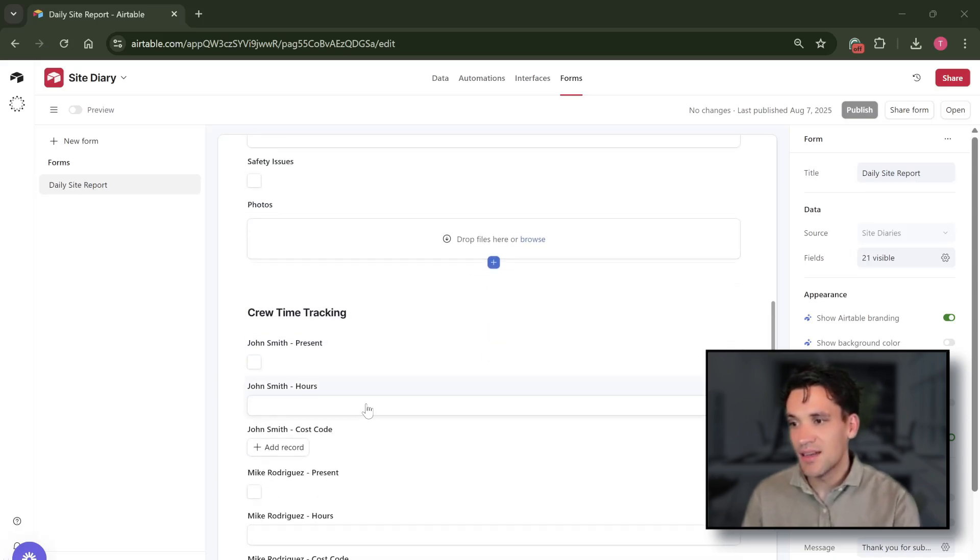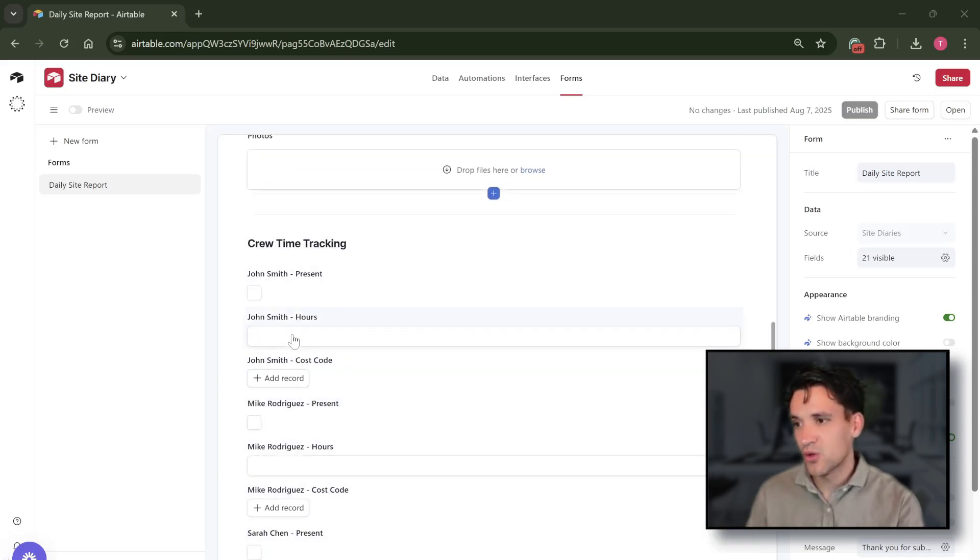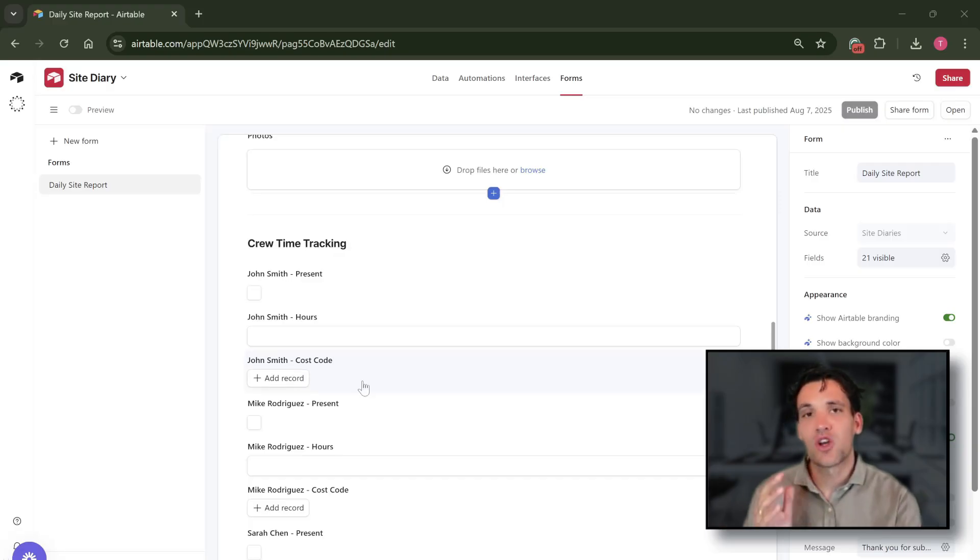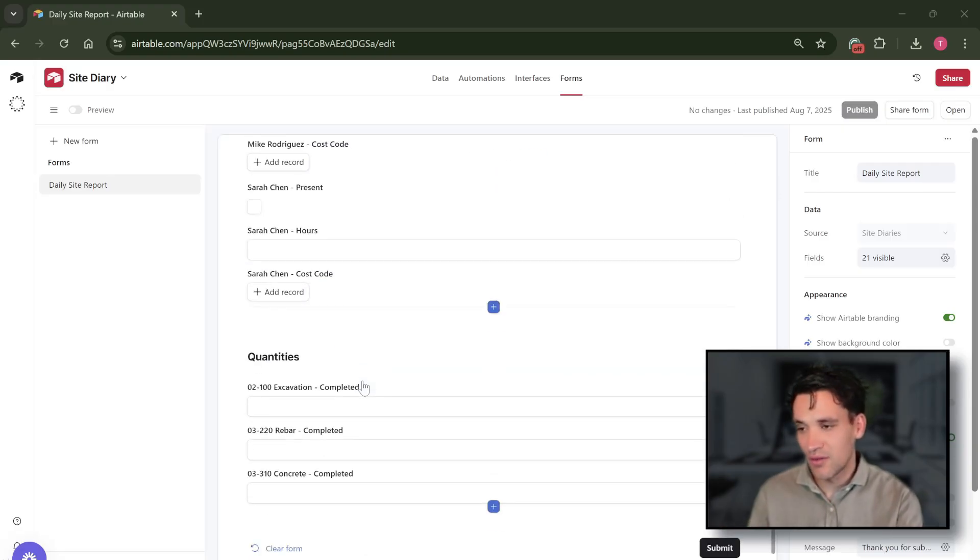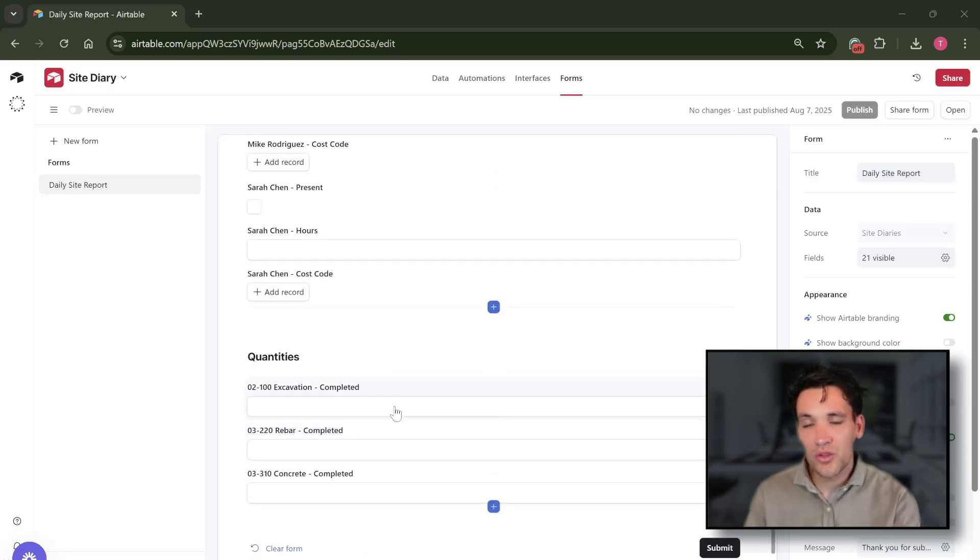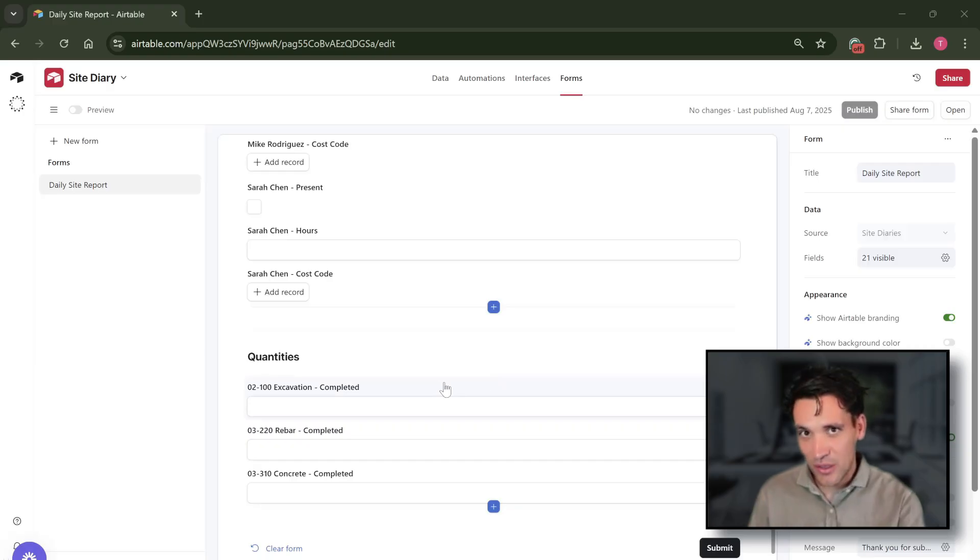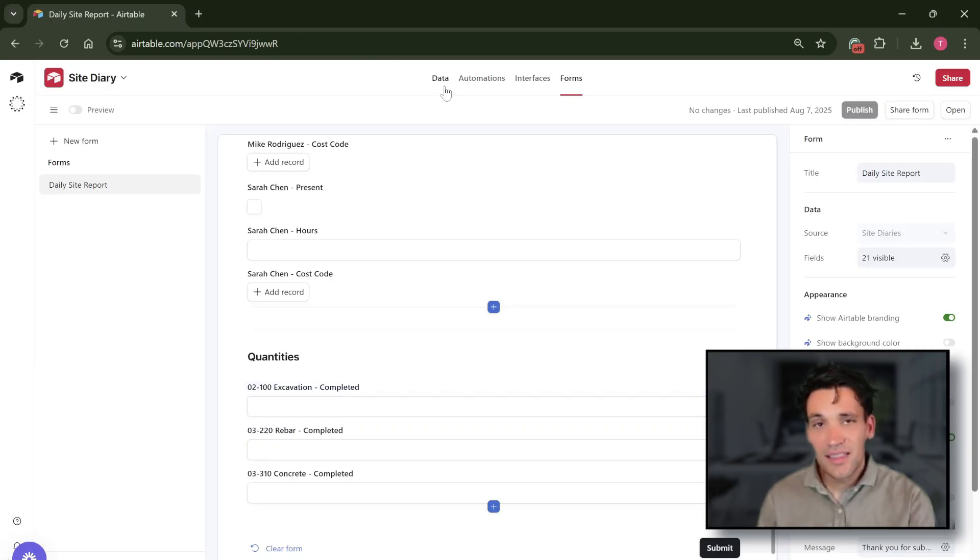Then for each of the workers in our crews we can capture the hours they've worked and the cost code that they've worked under, and the quantity of work completed against each of our cost codes.